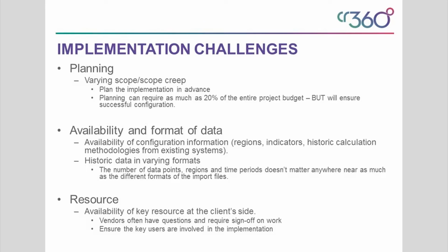So having that kind of good understanding of where your data resides and how you can pull that together is quite key. From a resource perspective as well, and again, this is common project process, but making sure that we've got key resource available on the client side. We have a relatively large team now within CR360, so we have about 40 to 50 implementation consultants who are configuring systems all the time, so there's always resource available on our side. There are generally fewer people on the client side who are able to understand software and have that knowledge. So it's always good to take into account whether people are going to be available, what other projects are going on, whether it's reporting season, etc., when you're planning these things in.